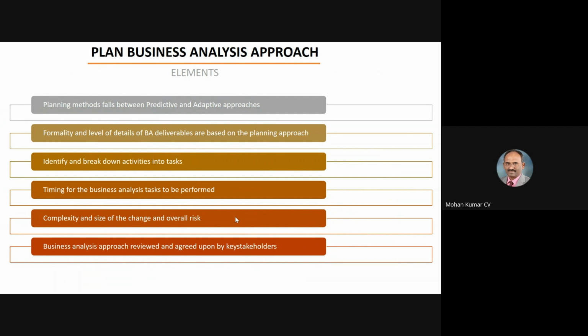But adaptive approach is different. I understand that the customer cannot give me all the requirements in the beginning. So I can have a broad scope, broad boundaries, but I can always approach the customer for any changes that they would require after seeing a prototype or after seeing the initial development. So this is another method, that is adaptive approach. You have to be very clear on how you want to approach the business analysis. Just because you're going for adaptive approach, you cannot postpone getting the requirements. Then everything will fail. So adaptive approach does not mean postponing the requirement collection.